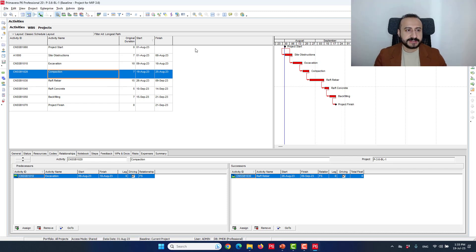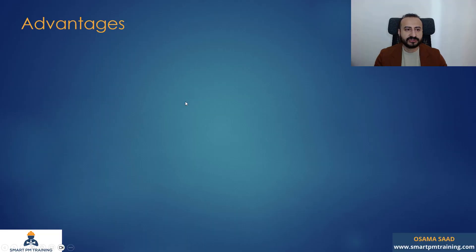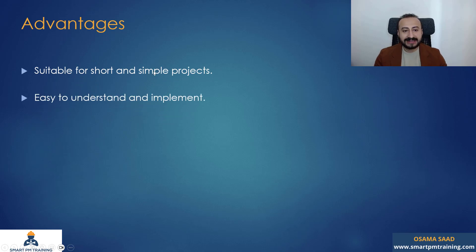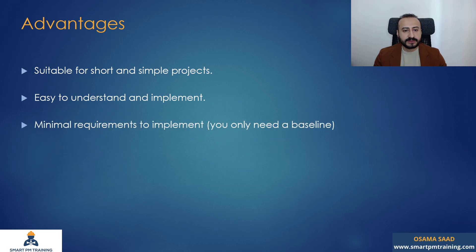What are the advantages of this method? It is suitable for short and simple projects. It is easy to understand and implement — as I showed you, anyone can understand and implement it. You need minimum requirements: you only need a baseline, nothing else.